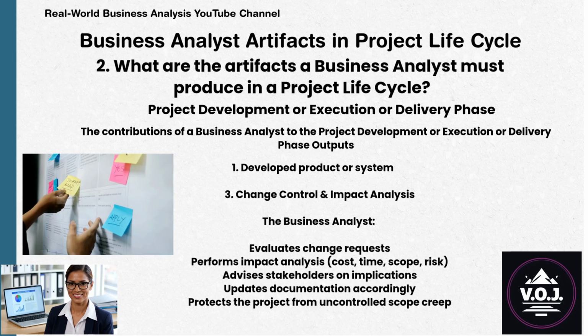Number 3 is change control and impact analysis. The business analyst evaluates change requests, performs impact analysis, cost, time, scope, risk, advises stakeholders on implications, updates documentation accordingly, and protects the project from uncontrolled scope creep.